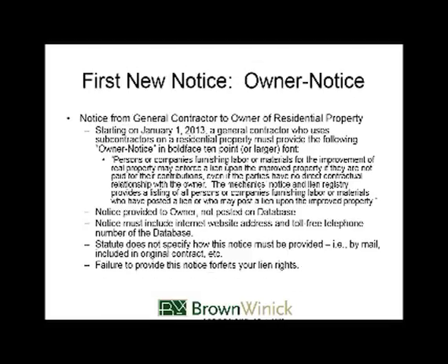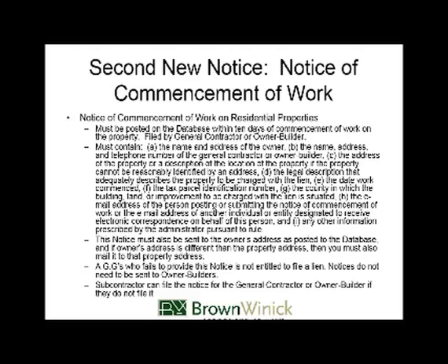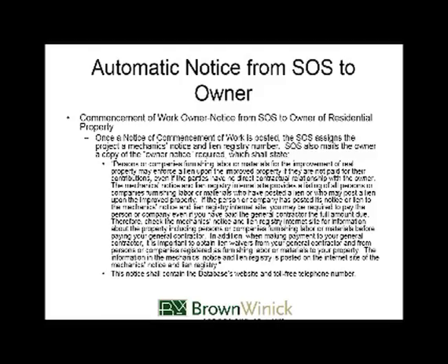So we had our first notice, the owner notice that we talked about. We have our second notice, the notice of commencement of work. Then what happens after you file the commencement of work? There's a commencement of work owner notice that the Secretary of State also sends to the property owner. And this goes out automatically. Once the notice of commencement of work is posted to the database, the Secretary of State will assign a mechanics notice and lien registry number to that.